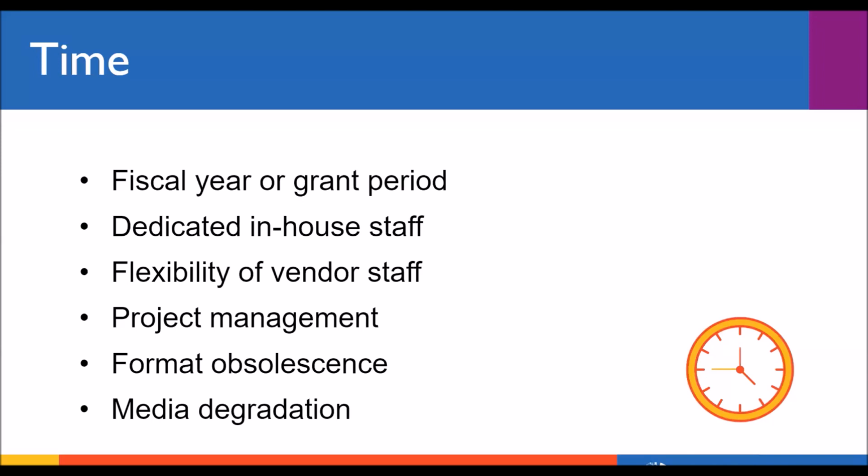In addition to having the equipment and expertise needed to digitize material, often time can be a factor in deciding whether to use a vendor. If you are constrained by a fiscal year or a grant period to complete a digitization project, it can be difficult or impossible to complete a project in-house. If you don't have dedicated staff that focuses on digitization, what happens to their other tasks when they're working on a digitization project? Vendors usually have a specially designed production facility that enables them to work with greater efficiency and speed than most libraries are capable of.